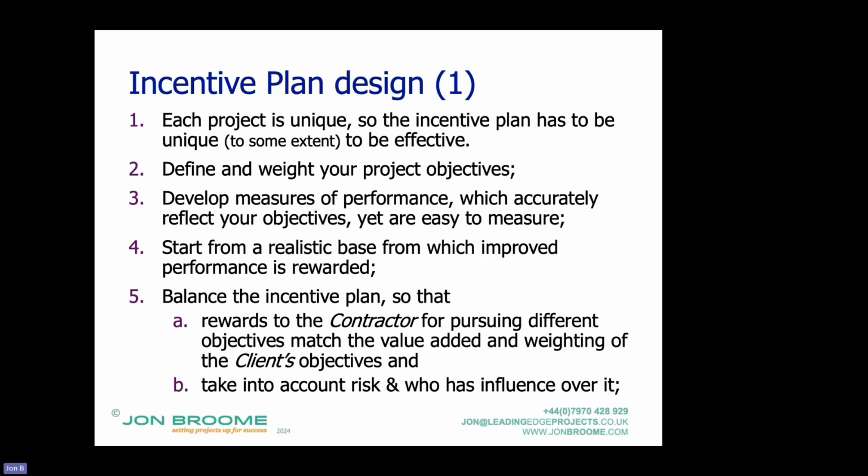If, on the other hand, the starting point is too hard, it's exceptional performance, the contractor might look at it and say, I'm never going to achieve that. I'm not even going to try. And if it's negative performance that you're motivating, or with damages, they might not even bid, or they'll add in lots of risk into their prices.